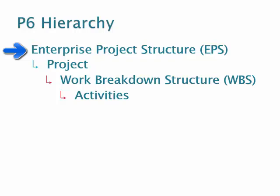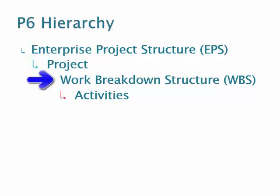Within each one of those EPS nodes, you can store all of your projects. That's the second level of your EPS or your P6 hierarchy. The next level of hierarchy is the Work Breakdown Structure, and then within the Work Breakdown Structure are the individual activities for your schedule.